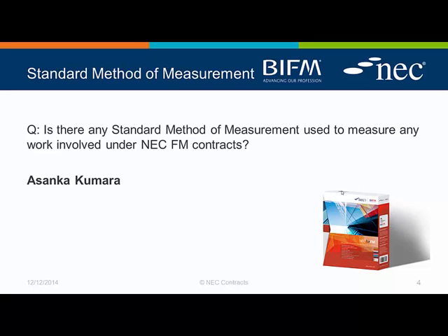So embarrassingly, as a QS, I ought to know this one readily, and I'm not absolutely sure, other than I do know that NRM3, which is New Rules of Measurement 3, has been produced by the RICS subsequent to SMM 5, 6 and 7, so we've now gone to a different approach using what's called NRM, or New Rules of Measurement. NRM 3 gives guidance on quantification and description of maintenance works for the purpose of preparing initial order of cost estimates. And the rules also aid the procurement and cost control of maintenance work.